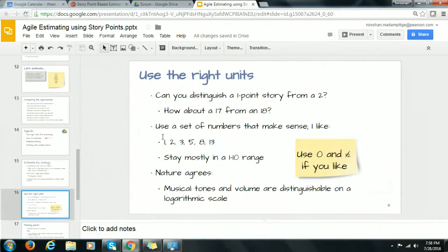What does this mean? Now, if you think of numbers from 1 to 100, experts don't suggest that you use that range. Why? Simply because when you use that range, you will try to differentiate with very minimal gaps. For example, 1, 2, 3, 4, all these can be possible estimations for you. Now, when you do that, you try to be more specific and your estimations can vary hugely. So to avoid that, what we generally use are standard indexes like the Fibonacci sequence or t-shirt sizes, etc.